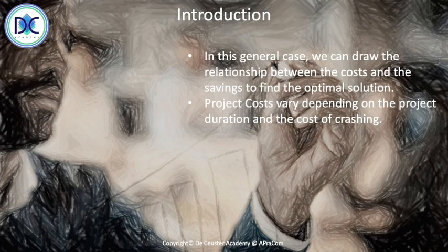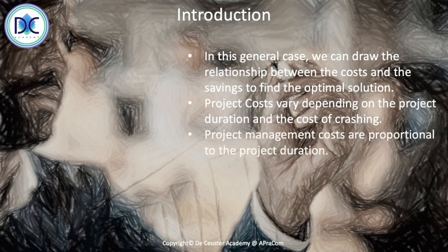When we look at the duration, what is happening? We have the cost itself for completing the project or doing the work. And here, when we reduce the duration, we have to add the crash cost. What does it cost to crash the activities for reaching a specific duration?